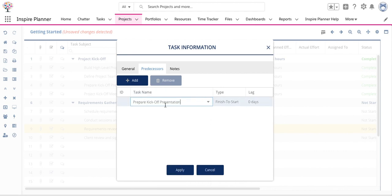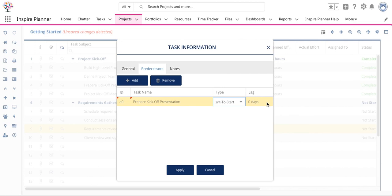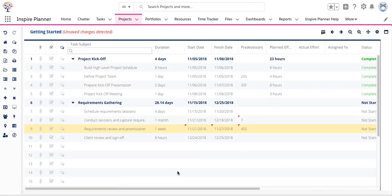So you just choose the task, choose a type. If you double-click here, you'll be able to choose that type. And then you can also set a lag time if you need to. Then just click apply and it adds that predecessor for you.